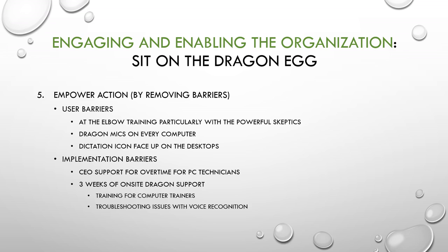doing this. We also made sure Dragon mics were on every computer, and that the Dragon icon was face up so that you could easily see it. And I went to the CEO and said, we need more support. We cannot install Dragon fast enough on all these machines. The demand is too high. So he gave us overtime for our PC technicians, and he got Dragon Nuance out for 3 weeks to train our trainers, so I had more trainers.